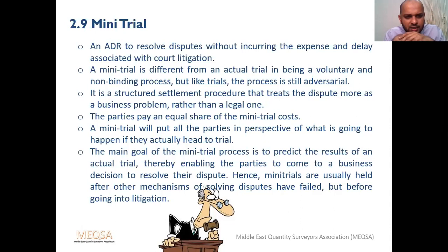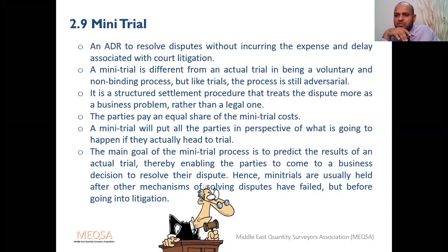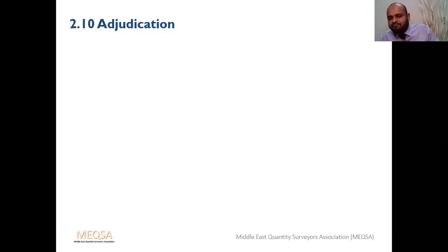The main goal of the mini trial process is to predict the result of an actual trial. A judge will look at this issue and tell you, if you go to the court, this will be the solution. So in between, you can settle the issue. Very simple. He will give an overall picture of who has the plus and who has the minus. And if you can go in between, you have the negotiation. If you go to the litigation system, you may fail or you'll get something. This is mini trial. Very little use of mini trial. I think in this part of the world, very few or zero.